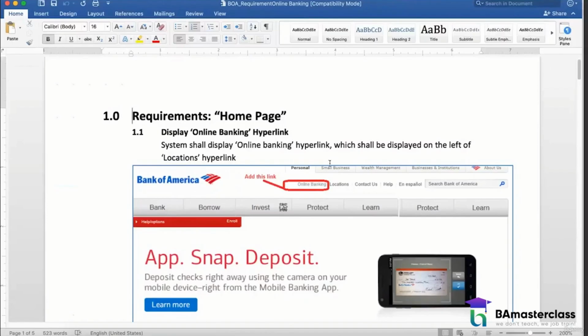So what you do then is you tell the SMEs, all right, let me first update my requirements document and let me send it to the change control board. Now, who's the change control board? It's a group that comprises a senior member from the following groups: a system architect, a senior QA, a senior developer, a DBA, and a project manager. So these are all the different team members that are going to work on your requirements.